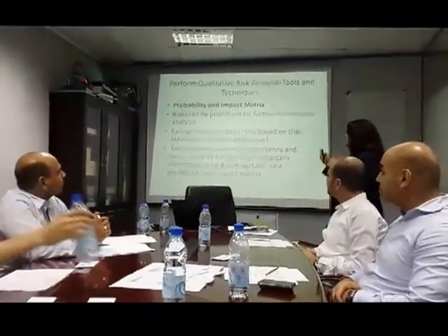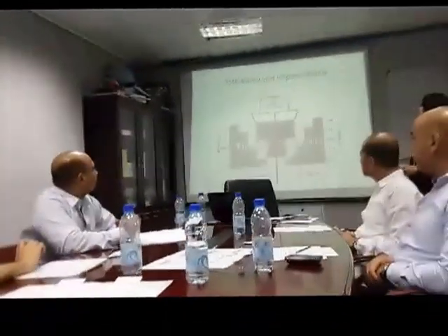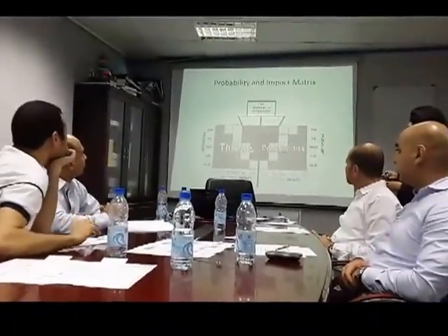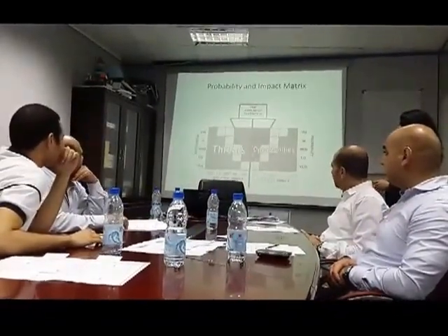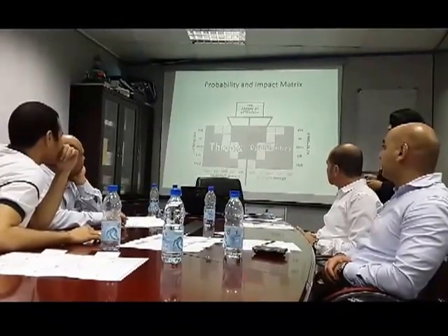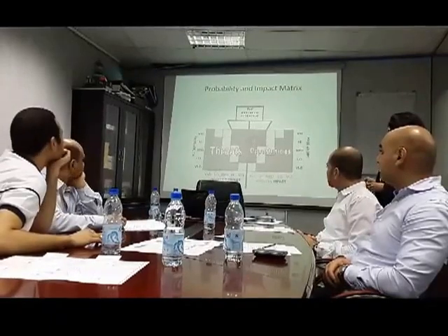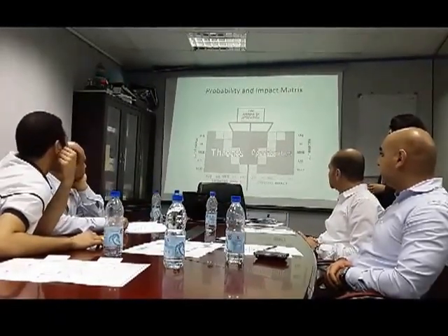So, the probability and impact matrix is really a lookup table, where you have values here. They have not written them, but we've got the results. After they write the values here, it's first of all split into two parts. We have the positive risks to the right, and the negative risks to the left. The parts in dark gray here are the high priority risks.